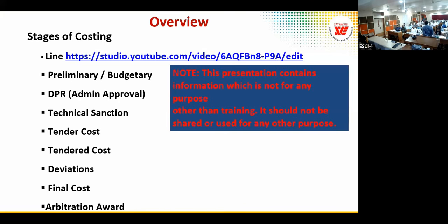Actually, if we do everything honestly with integrity, there is no problem, sir. Even with the DSR, if you follow it and it has exaggerated rates, the contract can come in for less, minus 10%, let us say, it's okay. That's good. Normally, what I see is that for any schedule of rates, call it DSR, SSR, or anything, the practical cost versus DSR will be about 10%.